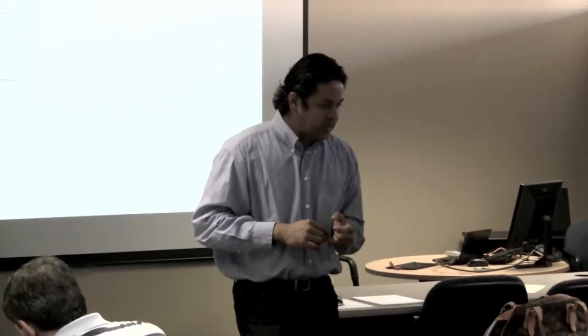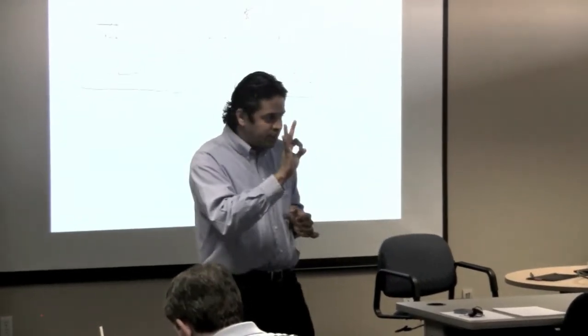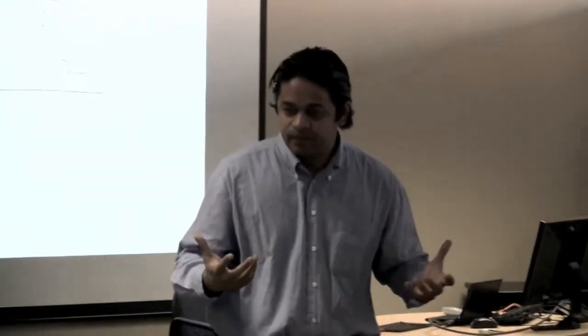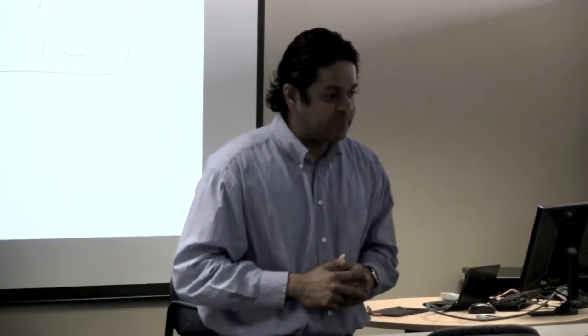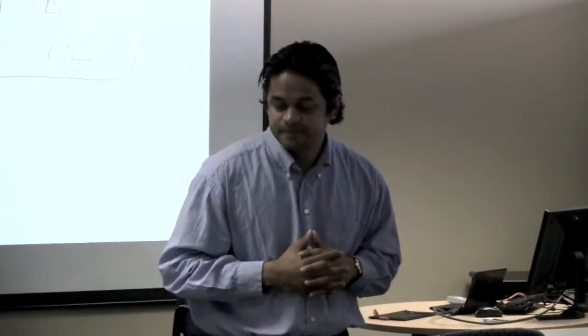Just prior to that is sub-projects. A sub-project is a strategy for overcoming three problems. You may have a scope that is very large, or a lack of consensus among the stakeholders, or an environment that is very undulating and unpredictable. As such, never attempt a large project in one shot. Always try to attempt it in small spurts, and you do that by breaking the project up into sub-projects. It's a major project broken up into smaller initiatives.